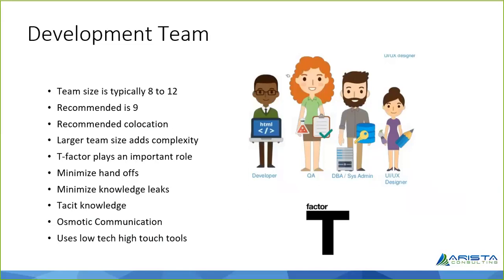So in our case, each and every individual in the team has got access to the plan and he can update the plan. So whatever he has started, whatever is in progress, whatever he has completed, he can update the plan that this is what I am doing and this is what is completed. There's no project manager, so there is no one else to update the plan. It's the individual.